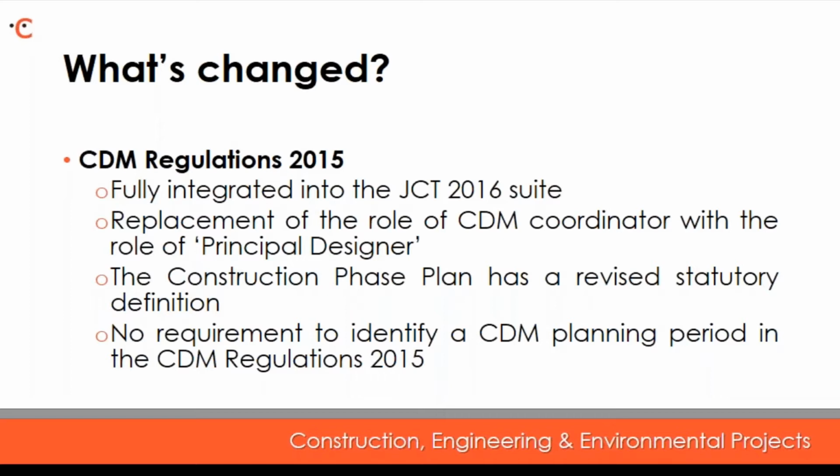Current bespoke schedules of amendments in place and currently being used with the 2011 suite would not be applicable to the 2016 suite of contracts. Parties should therefore make sure that they are using an appropriate schedule of amendments before they enter into the new 2016 edition form of contracts.